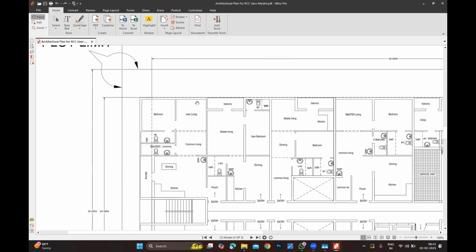You need to get that. You need to submit the draft detailed design to the authority. It is not like the municipality or DD, where you can finish the entire thing and submit it as one package. In Abu Dhabi, it's entirely different. Each stage you need to submit to the authority to get approval, because authority involvement is required at each stage.